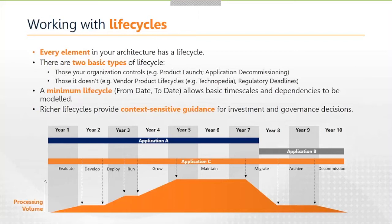For example, if we know that from the middle of year seven we're going to be migrating data or processing off an application, we might want to close the doors to the business and say no more business or products go onto this application at the beginning of year seven. We can actually use time-based criteria to start to govern investment and drive governance.